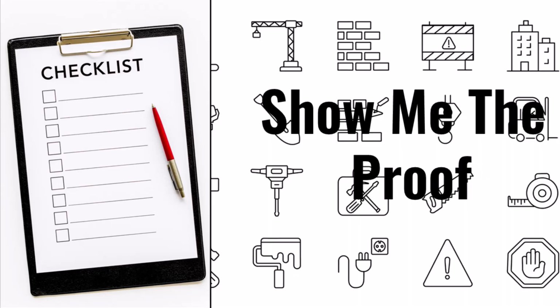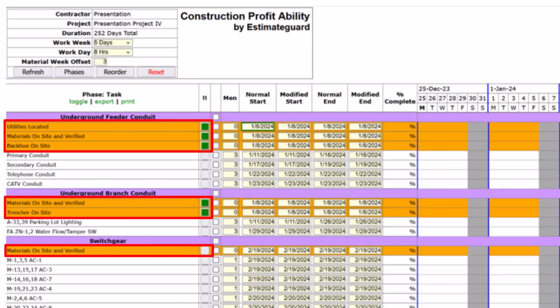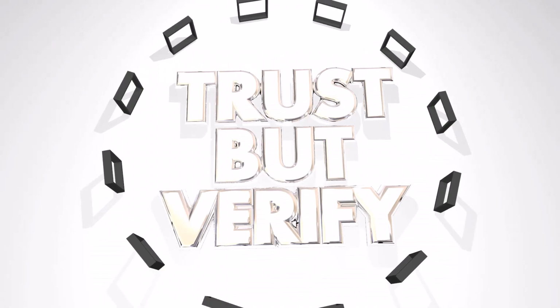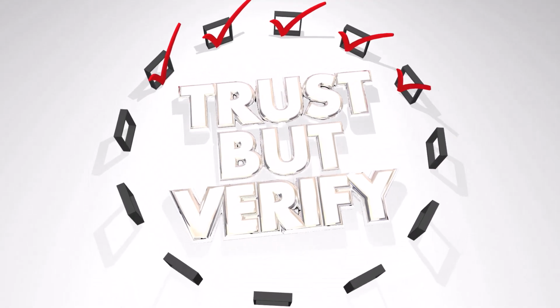The next night, I showed up on the deck with a checklist of every item they needed to do their work and made them physically show them to me an hour before any trucks arrived. That's why we added checklist items to our construction scheduling software. Trusting field leaders to make sure they have everything organized for their crews is not enough. You need to trust, but verify.